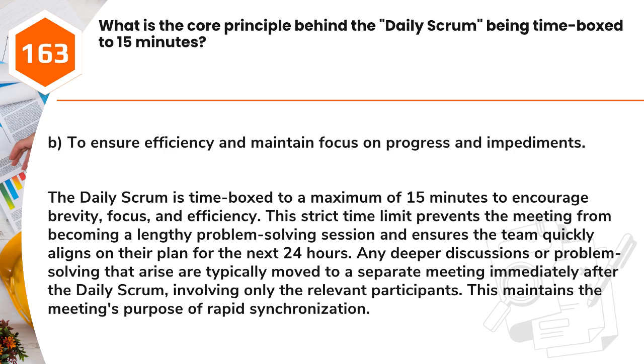Any deeper discussions or problem-solving that arise are typically moved to a separate meeting immediately after the daily Scrum, involving only the relevant participants. This maintains the meeting's purpose of rapid synchronization.